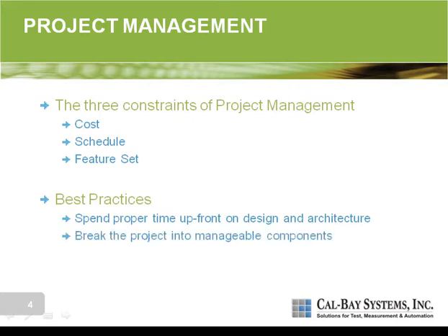The second best practice is to break the project into manageable components. And again, rather than just assigning this vague task of a test software project to a single engineer and saying, go get it done, a much better practice is to have a senior architect break the project into pieces and hand those pieces off to team members who have experience with each piece. And some of those team members may be in-house staff, some of them may be outsourced, and sometimes those pieces may be tools that you can buy off the shelf. And so that leads to the third best practice, which is do a build versus buy analysis on every single component.